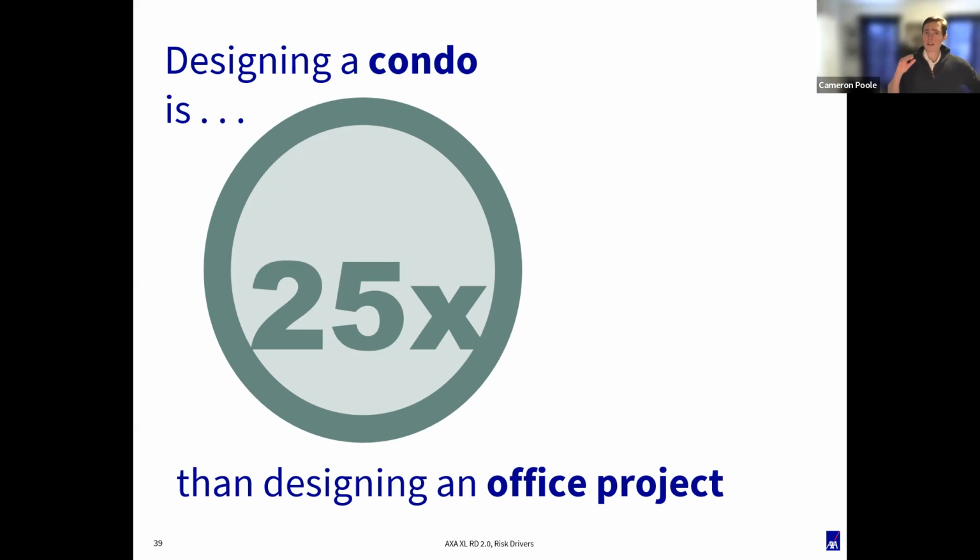Yeah, and so if you're working with an individual client, their specific condo unit, or it's a building with, say, 3 condo units, that's a much lower risk. You can sort of evaluate them as you would a single-family homeowner. You still want to get their level of experience. The other thing you want to look at when you're doing a single unit is the neighbors, right? I'd ask the question, how's the relationship with the neighbors? Do they know you're going to be doing this work? Are they okay with it? Because that can potentially spell issues, right? That's a third-party claimant that could be upset by the fact that they're doing this construction work.